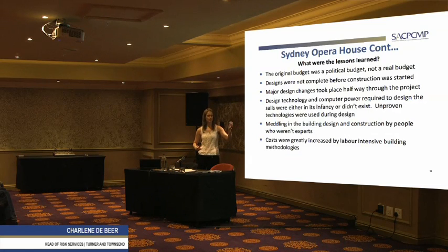And it's not even always technology and computers. We can have simple things like resources in the country. If we look at welders in South Africa these days, how many skilled welders do you get? With various major and mega projects running in the country, there's only a handful, which means there won't even be enough to service all of those markets.